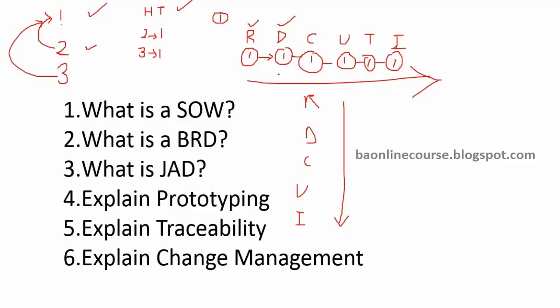Similarly, when you write the programs also, this program would meet requirement 1, 2, 3, or 4, 5, 6, whatever it is. So you'll do that one-to-one linking. Effectively, if there are 1,000 requirements, we are ensuring that all those 1,000 are translated into your finance system. So that is traceability.